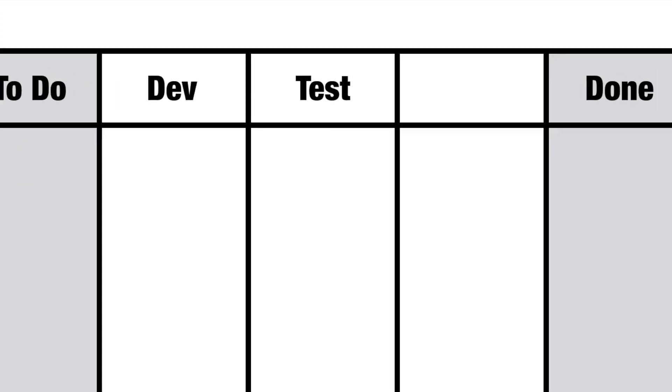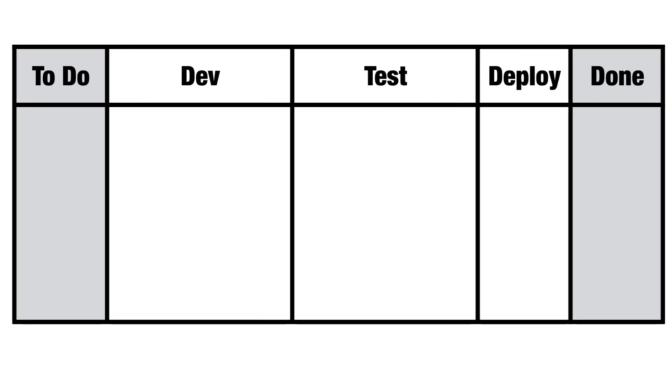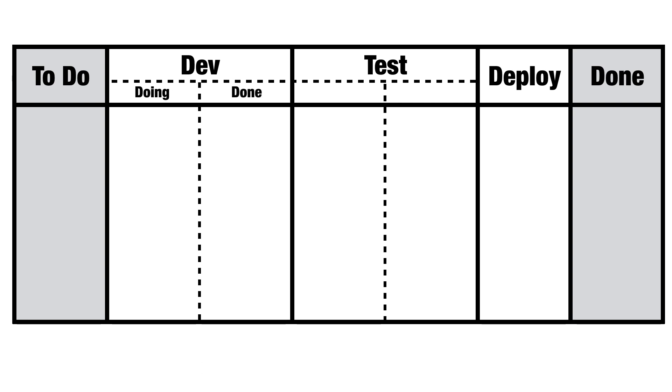Let's step out of the coffee shop for now and make our board a little more development oriented. How about a defined process of develop, test, deploy? Now, if I was working alone, this board would work as it stands. But if I'm working together with dedicated developers, dedicated QA/testers, and even dedicated deployment personnel, then we're going to have to add in a little bit of orchestration to handle the handoffs between our specialists. And as you know by now, that means buffer columns — and again, it's with a heavy heart that I'm coloring them gray.